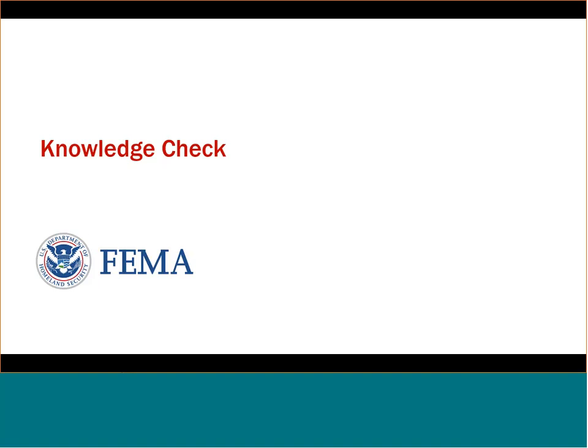All right, so what is required as part of your budget and financial commitment? That would be a match funds commitment letter. We do want to see a detailed cost estimate as part of your application, right? So your application would have a cost estimate that shows how you've arrived at that, or a budget narrative. But what is required is a match funds commitment letter, to make sure that the responsible entity, the tribal council, the tribal government, president, or executive has authorized that amount of funding.